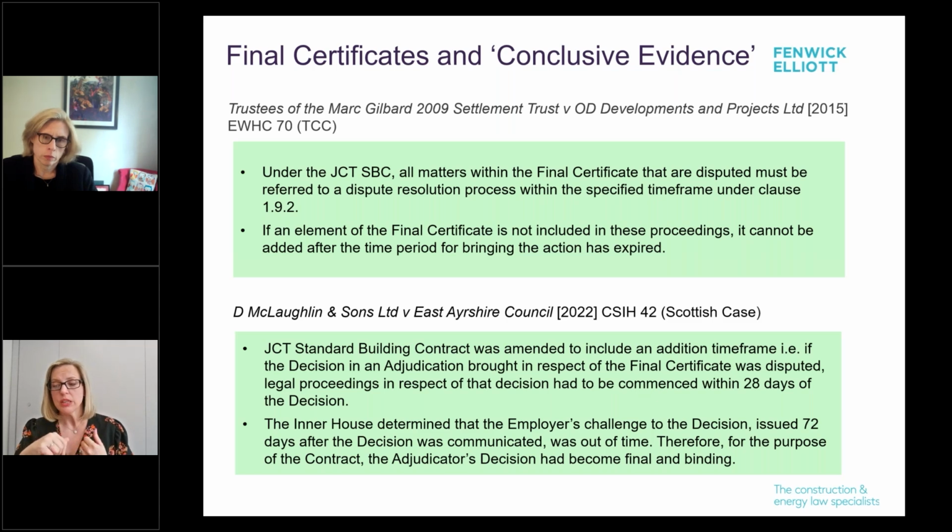Just note as an additional point, this decision also highlights the need to be careful about the dispute resolution route that you choose. Here, the judge held that you couldn't start an adjudication after a claim form had been issued with the court. So the dispute had to go through the full litigation process when evidently the claiming party would have preferred to adjudicate. So just keep an eye on that.